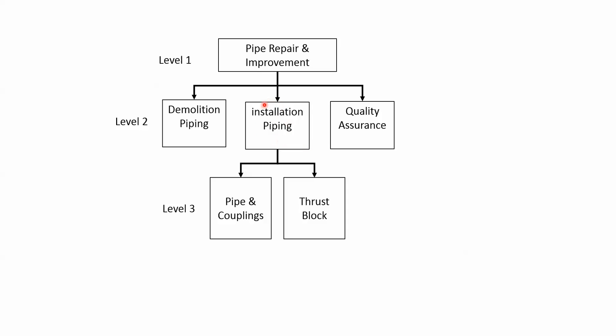Installation Piping breaks further down into Pipe and Couplings and Thrust Block. Pipe and Couplings would include the Installation of Piping, Installation Adapter Couplings, and also Installation of Pipe Insulation.